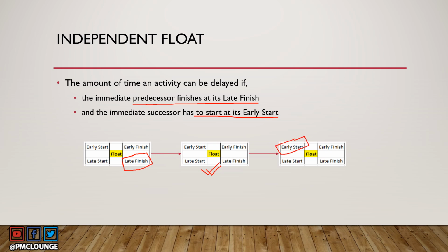So let's say this value is 4 and this value is, let's say, 8, right? And the duration of this activity is 2, which means even if you finish late in the previous activity, you start at 4, you will finish at 6 because 2 is the duration of the middle activity, and early start is 8, which means you have a waiting time of 2.